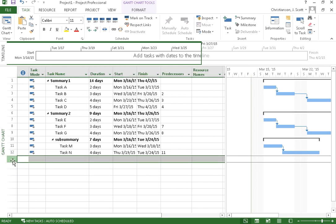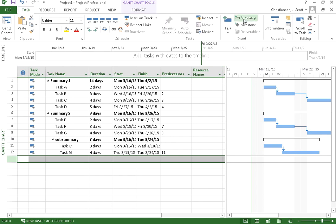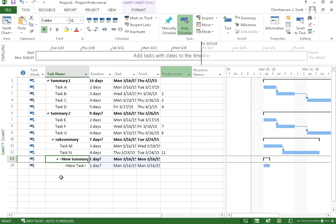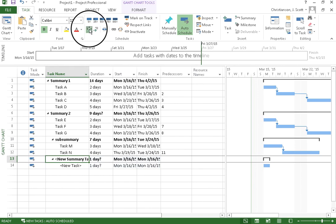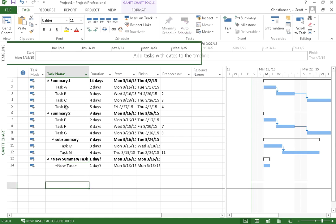You can also, if you select on a particular line here and you come up here and you say you want to insert a summary task, it will create a summary task and a new task underneath that for you as well. Now I can simply move those back out if I want to whatever level I need them to be at.